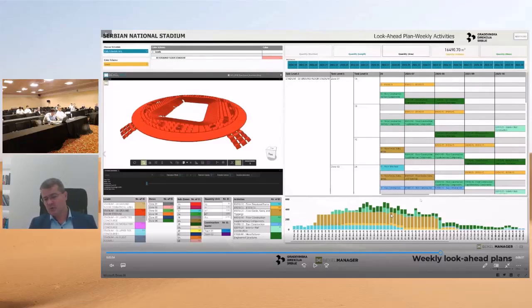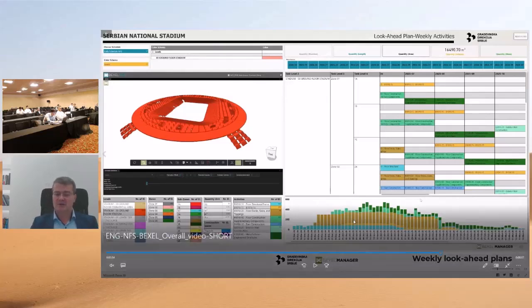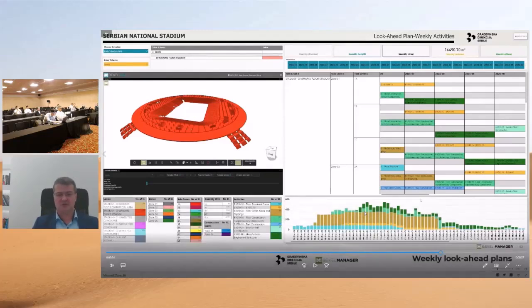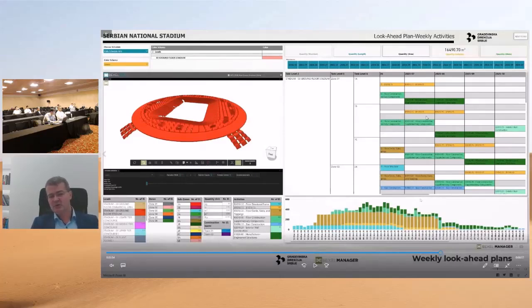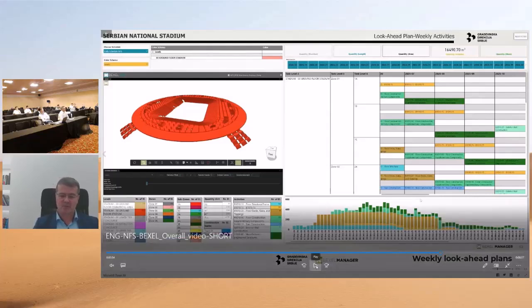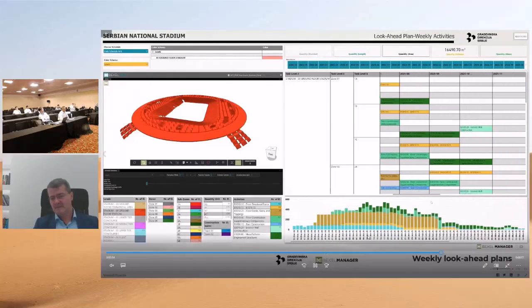And so you see the works are very intensive, so literally we have to put around 400 cubic meters per day, which is not so easy, but you can see with the different colors and different uniform codes who should do what and when. And whenever you filter each part of the project, you see this analysis. And this is very helpful, especially in the construction execution phase.